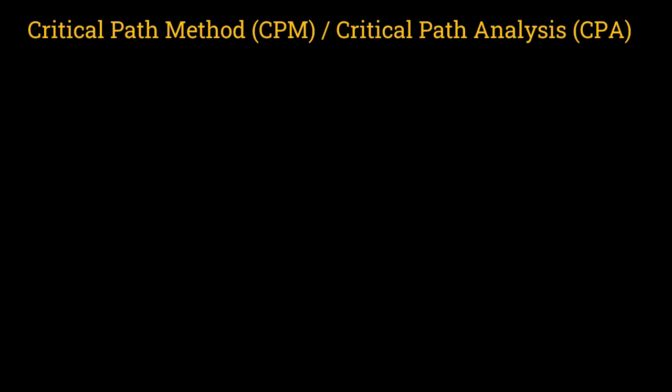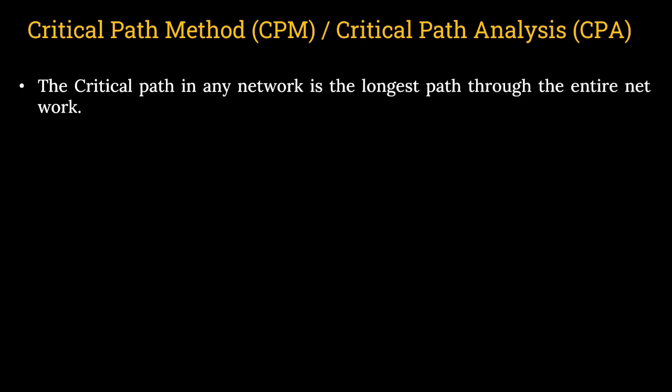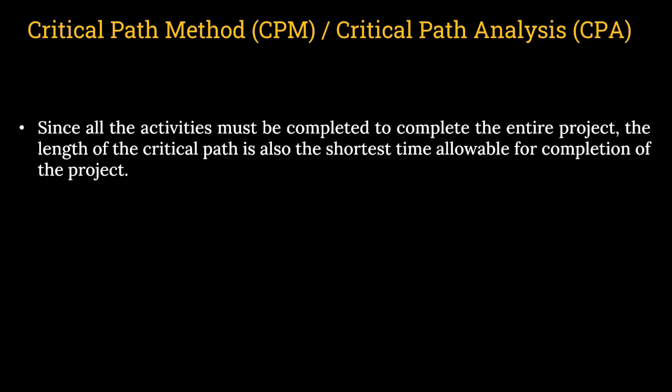Now we'll talk about critical path method or critical path analysis. What is that? This is a very important point. Remember, the critical path in any network is the longest path through the entire network. That is the first point. Second thing, since all the activities must be completed to complete the entire project, the length of the critical path is also the shortest time allowable for completion of the project.